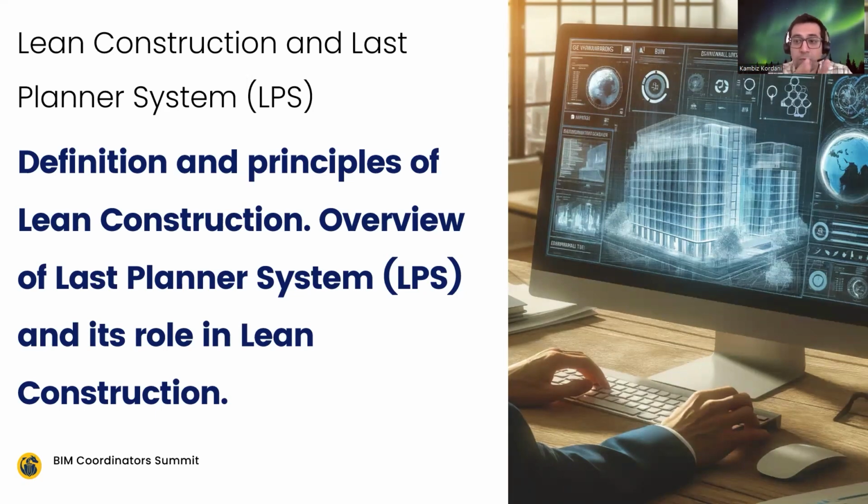The last planner system also emphasizes the importance of making workflow reliable. Workflow is somewhat missing in the critical path method, but in the last planner system, we are focusing on workflow and also the reliability of workflows.